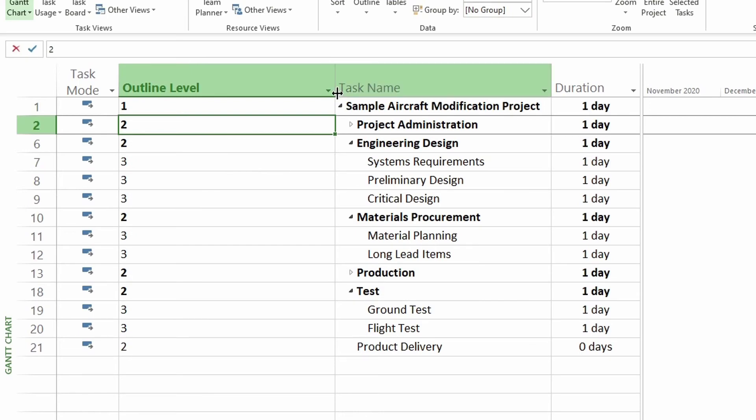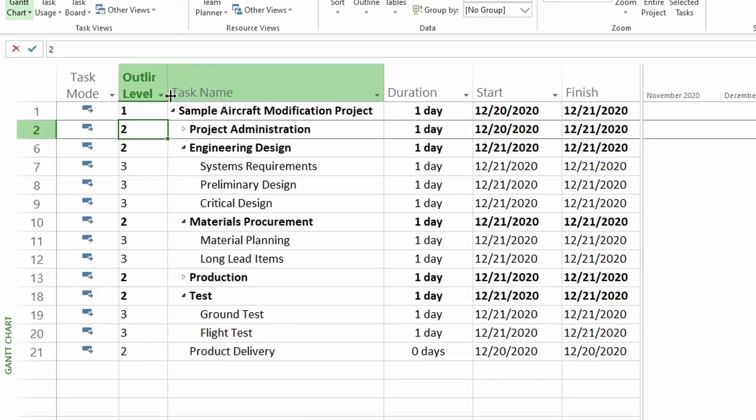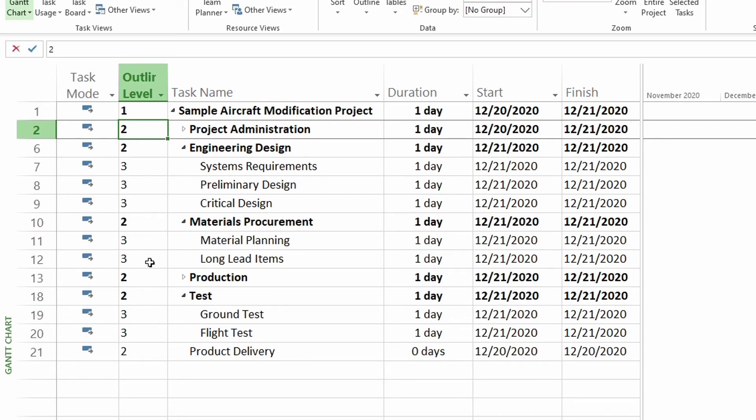And now we have the outline level column in here and you can see at what outline level each task belongs to. So say I want to have all my tasks roll up to level two, because most of my summary tasks are level two. I can go do that.